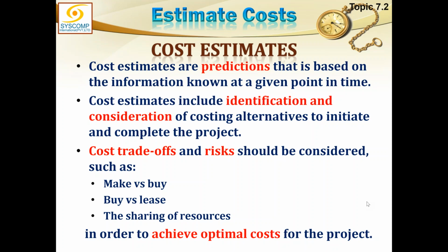Second was when we do not have the capacity. Well, we are capable of doing that thing, but we do not have enough resources. We know how to do it, but we do not have so many people or other resources to do it by ourselves. Therefore, it is convenient to hire someone from the open market who has sufficient resources and who also has the capability to do that. So we outsource it to that person.